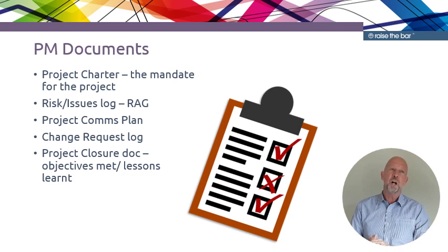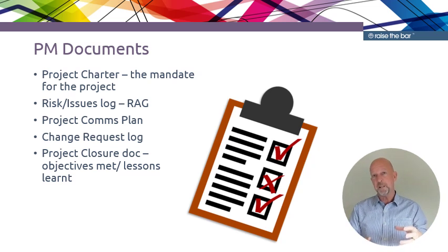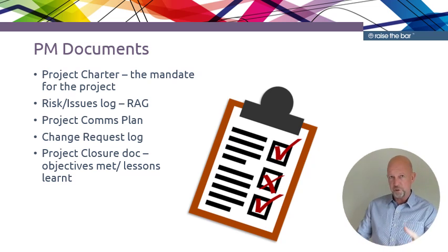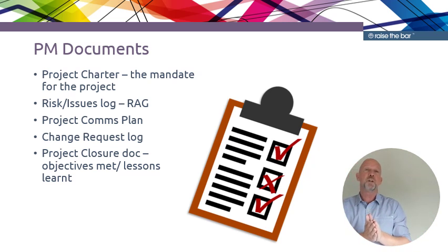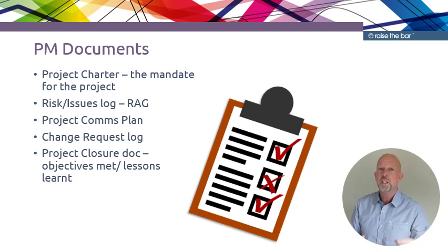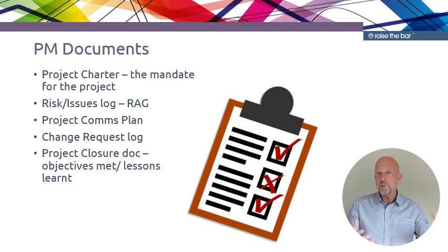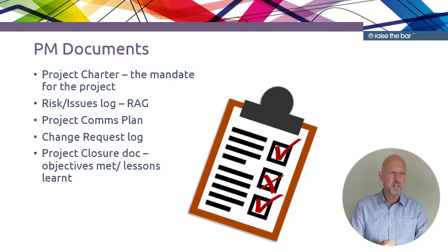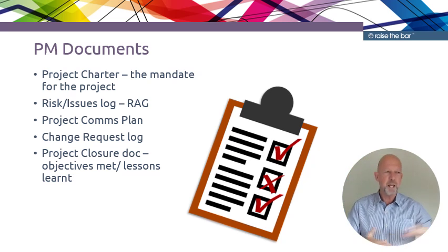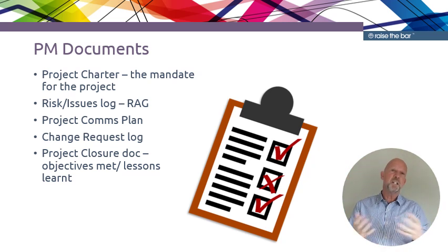So a good project manager will spend time evaluating the success of the project through its duration, but then also needs to look at some kind of handover. So part of the project closure will be a handover document to the people that will then be using the new way of working on a more regular basis, whether it's a new train station, an extension to an airport, or simply a new IT system embedded into an organisation, to make sure the users of that are going to be happy with it and know what it is they're doing.